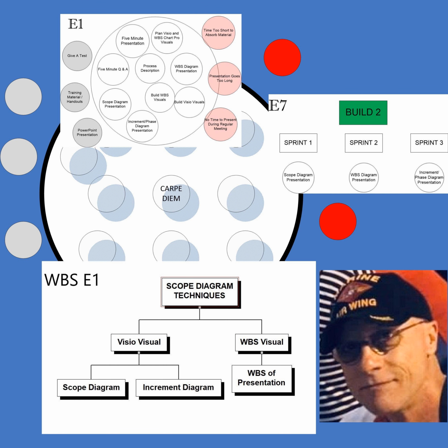So let's look at this as a whole, right? You figured out what the scope was. Everybody was involved. All their systems were notated. Everybody's defining each one of those bubbles. You defined all the deliverables in the WBS. Then you did a quality check between the two. Then when you were done with that, of course, the stakeholder list is updated. How else are you going to figure out who to talk to for the scope? So you did that first. So now you did the quality check between the scope diagram and the work breakdown structure.